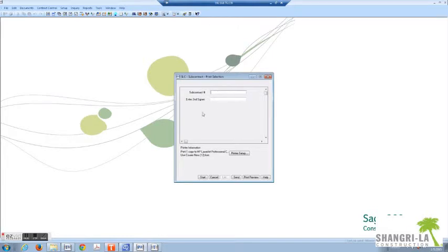You'll enter the subcontract number or commitment number. I will enter one that I believe exists here. Let's try 130143-15-01. Second signer is for contracts over 25,000. It requires 2 signers. I will put my name here. It may not always be me. It has to be an executive of the company, either the qualifier or the president, CFO, or secretary, 3 authorized officers. My name. Let's see what shows up.